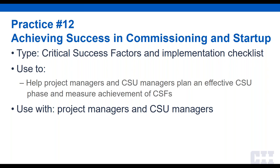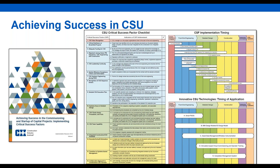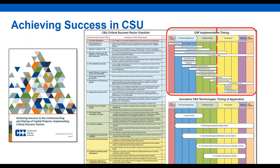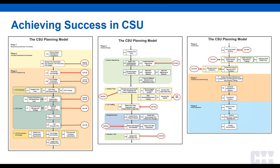The last practice is Achieving Success in Commissioning and Startup, related to the planning for startup model. This tool identified 16 critical success factors and 45 indicators of whether those CSFs have been achieved. Like the planning for startup model, these are significantly front-loaded — by the end of detailed design, 13 of the 16 CSFs should have been started and 9 should already have been achieved. This team did a great job connecting this practice to the planning for startup process, mapping the 16 critical success factors to that process — so the two practices work extremely well together.